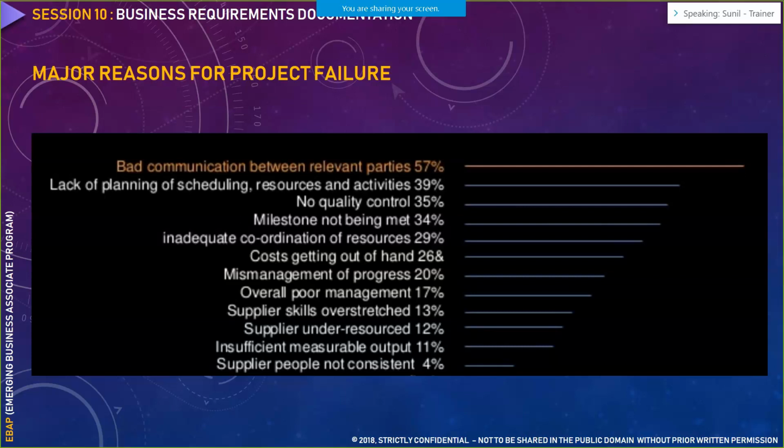The other aspect of why BRD came into picture is what used to happen in earlier days: the customers, the business sponsors, used to give requirements in any XYZ format, any XYZ documentation. Now, after you had developed that particular system, they used to ask for additional features or additional requirements. And there was no contract or, for that matter, document which clearly indicated that before taking this project, you requested only these things. Now you cannot ask for additional things.